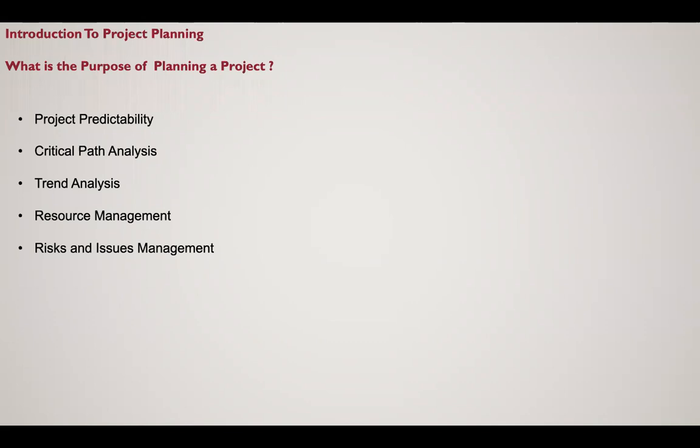So, and that thing is going to take 6 weeks to come. So you need to order that thing by the beginning of that project. And if that thing doesn't come in 6 weeks' time, because you needed it in 6 weeks' time to be able to complete the rest of the project, then there's a problem. So you need to identify such items as critical.